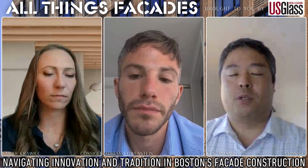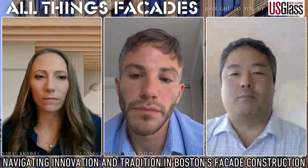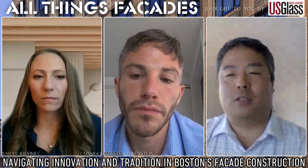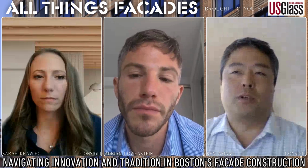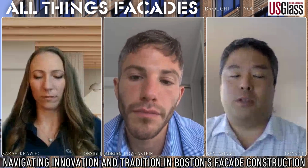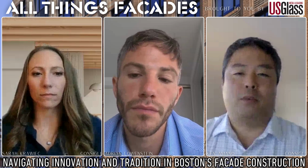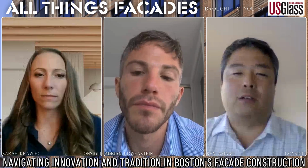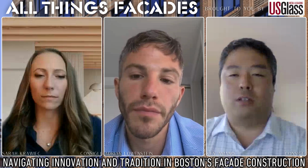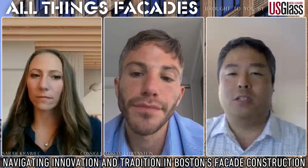Price obviously has a huge part of this, but in the end, I think most of the sophisticated subcontractors and trade partners that we would do design assist with are now completely geared toward that, especially in the Boston market. Most of our major partners won't do anything but design assist anymore, just because they know that there are too many pitfalls if they're just trying to bid on something that may or may not fit them, right? The design's fully baked, and then you find out later that you have all these structural coordination issues that no one anticipated, and then double design obviously is a tricky thing in terms of liability and taking on that responsibility. But design assist essentially becomes delegated design anyway, regardless. So at least it gives you a head start.